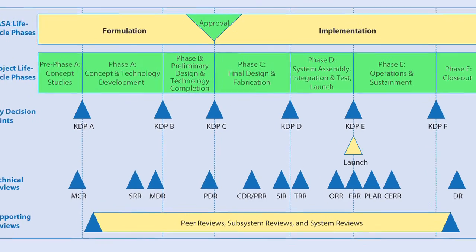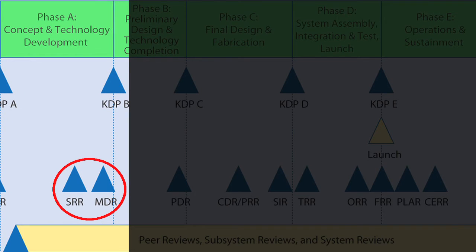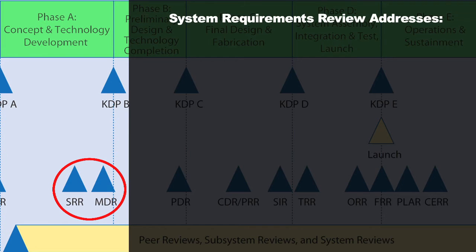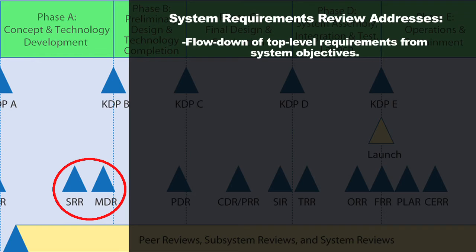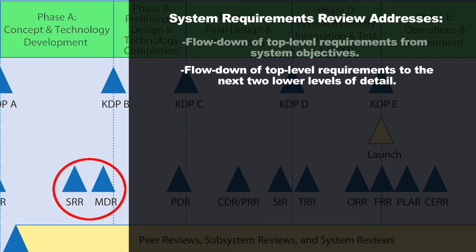The primary technical reviews in Phase A include a System Requirements Review and a Mission Design Review. The System Requirements Review brings in the external technical team to assess whether your top-level requirements have been clearly defined and whether they fit with the stakeholder-defined system objectives — checking if the flow-down was done correctly. The team also checks whether those requirements were taken down to the next couple of levels to form a complete set of high-level requirements capable of meeting the system objectives.